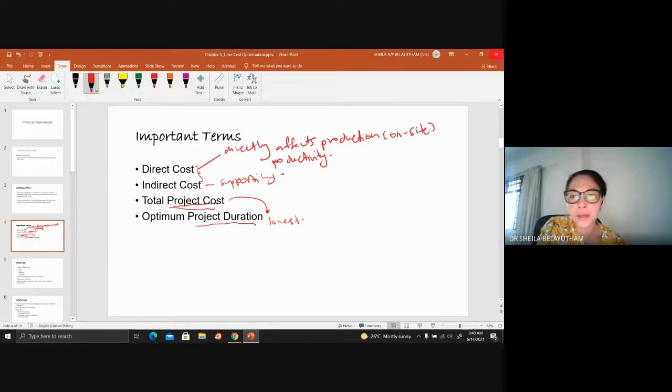So it goes back to the priority matrix first. Okay, so is the cost factor or is the time factor a constraint or to be enhanced? So it relates back to what the client wants. So we might provide, or we might give this option that okay, the cheapest cost occurs at such duration, but ultimately it depends on the client to make the decision.